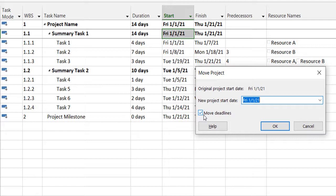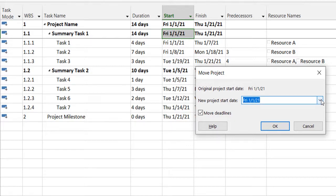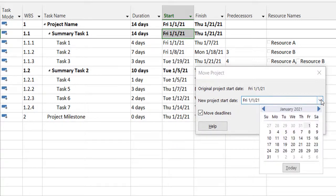this feature will move those along with the plan as well. So it will keep the dependencies in place and move the entire project from the start date to the date that I give it.